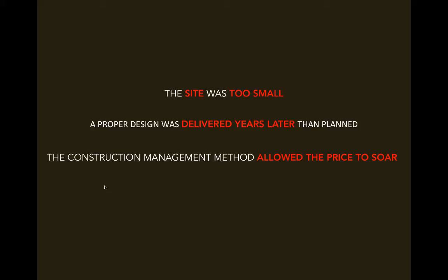This is right from the report. I'm just lifting quotes out of the report. The site was too small. Proper design was delivered years later than was planned. And the construction management method allowed for the prices to soar.